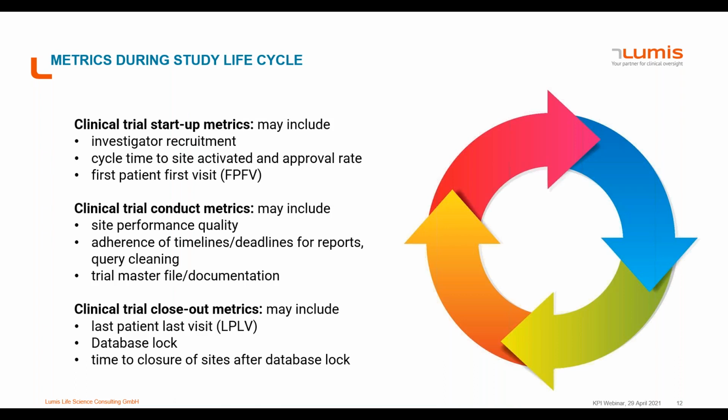Here are some examples of what kind of metrics you can measure during the study life cycle. If we take the three main parts, we have the clinical startup, clinical trial conduct, and clinical trial closeout metrics. For example, during the startup, you can measure the investigator recruitment, the progress of investigator recruitment, or first patient, first visit.